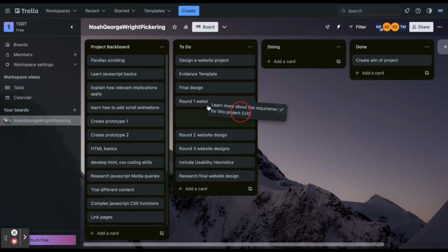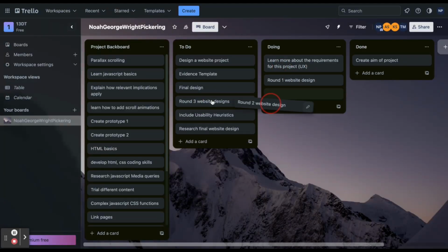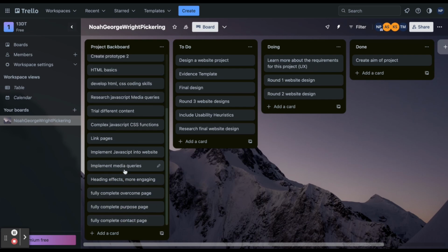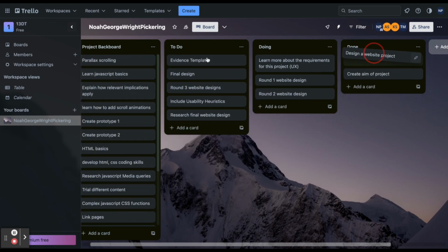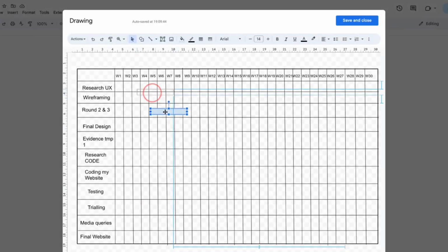I used Trello as a project management tool aiding development and feedback on cooperation. Its board structure organized tasks into 2 doing and done categories, ensuring efficient task management and time allocation. Having a Gantt chart enabled my time management to be efficient and follow a schedule. I was able to track my progress because the Gantt chart is broken up into 1-week blocks of time and will be split into 2 colors, showing the plan versus the actual time taken to complete that segment. This gave me a visual representation of my project and how well I'm staying up to date.